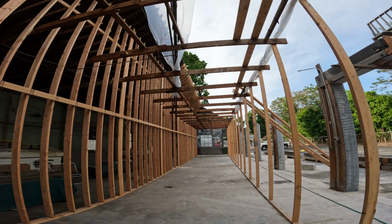Yeah, had a good day, got everything we wanted to done, and hopefully that lumber order comes Tuesday first thing, because we are going to build the temporary wall, demo the rafters, cut out the headers, and that's all of next week. And then I'm hoping the week after that, my metal posts are ready. I can start laying out those anchors. It's gonna be a lot easier to lay my anchors out once all that's demoed and out of my way,